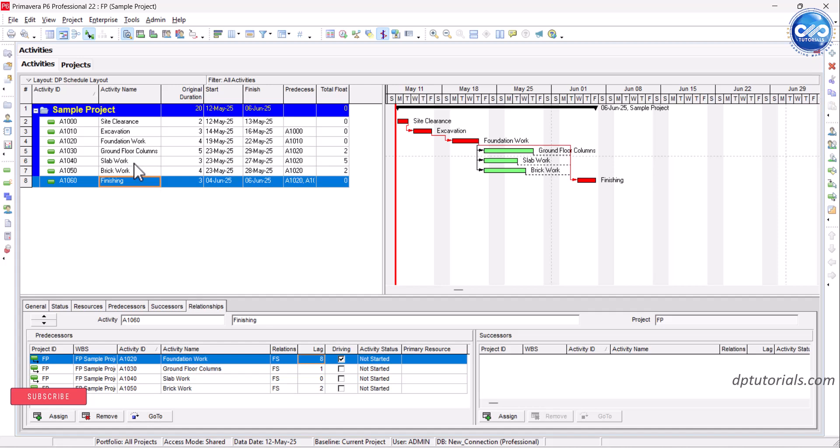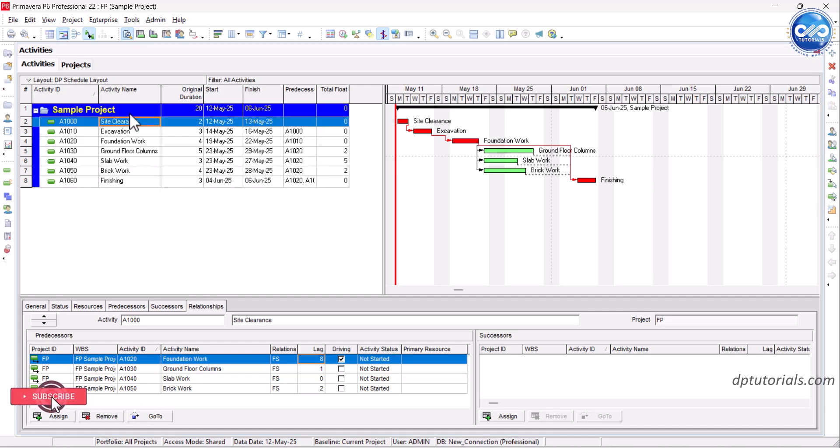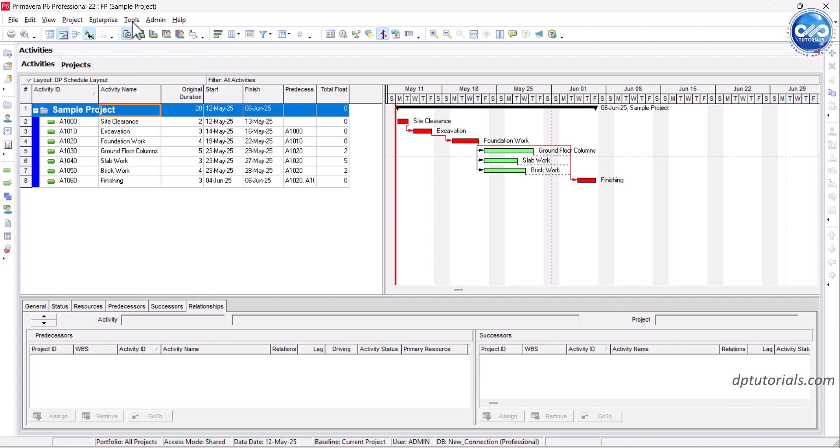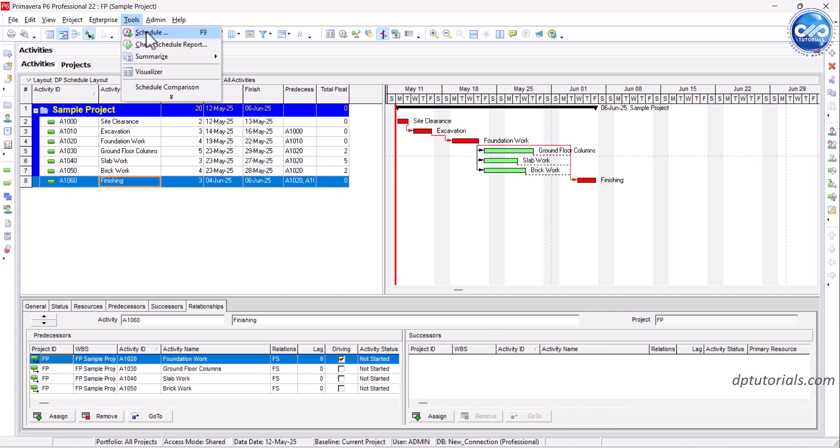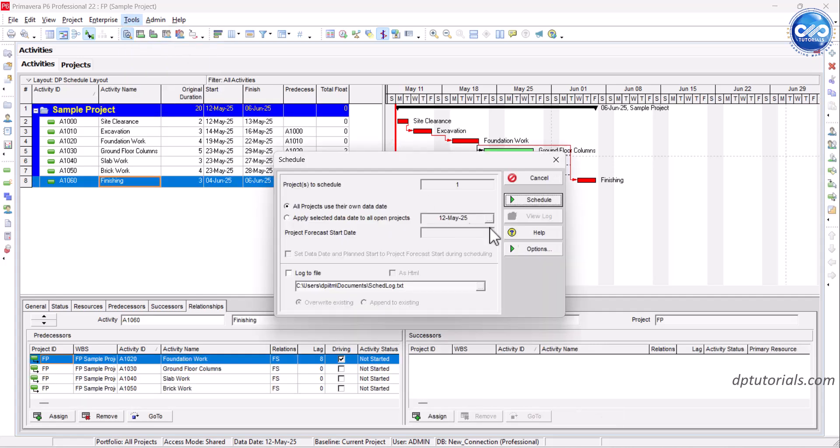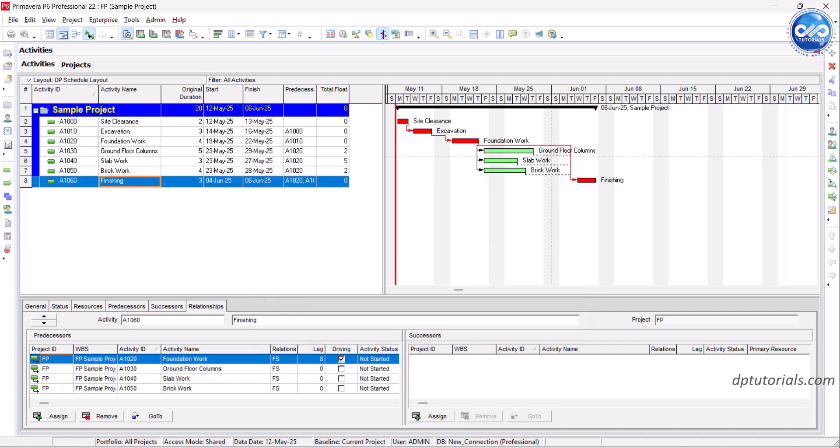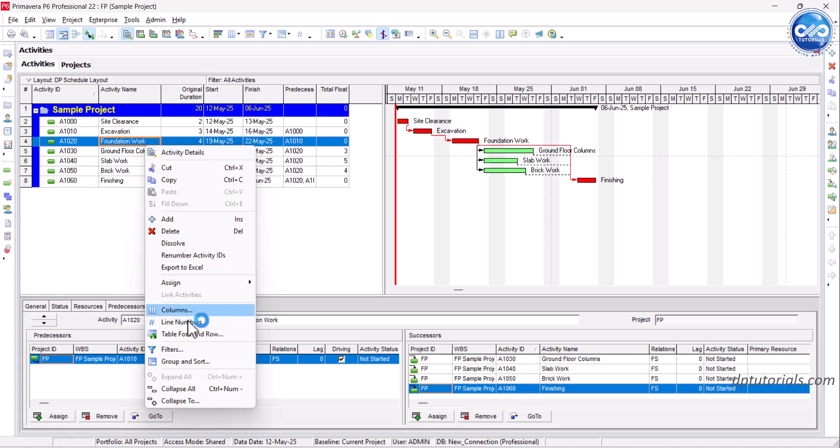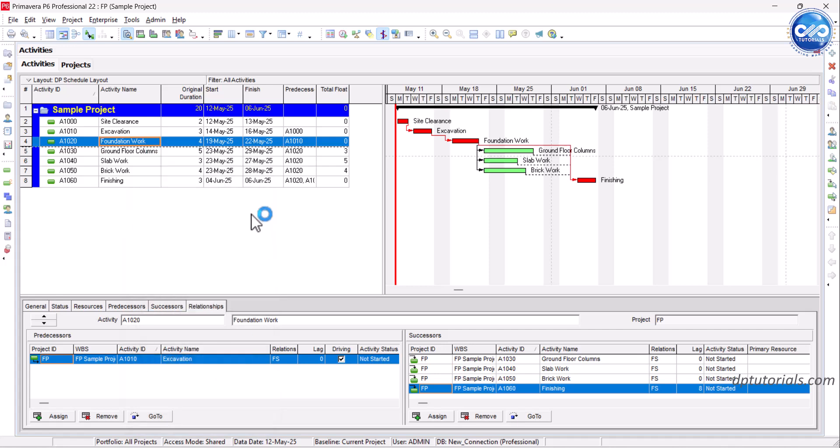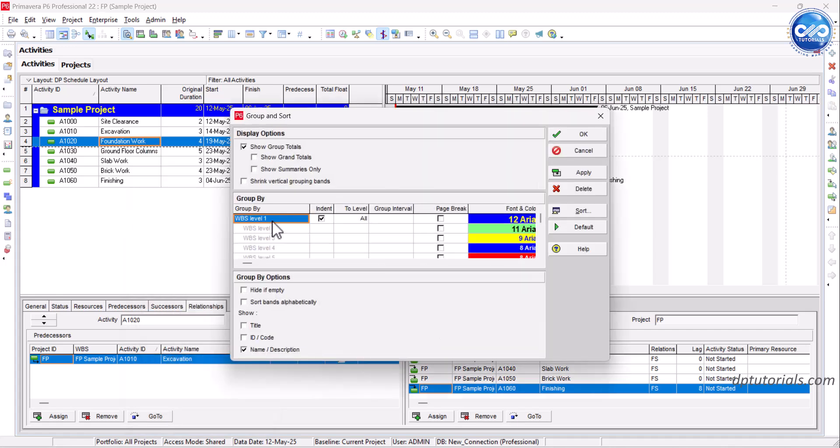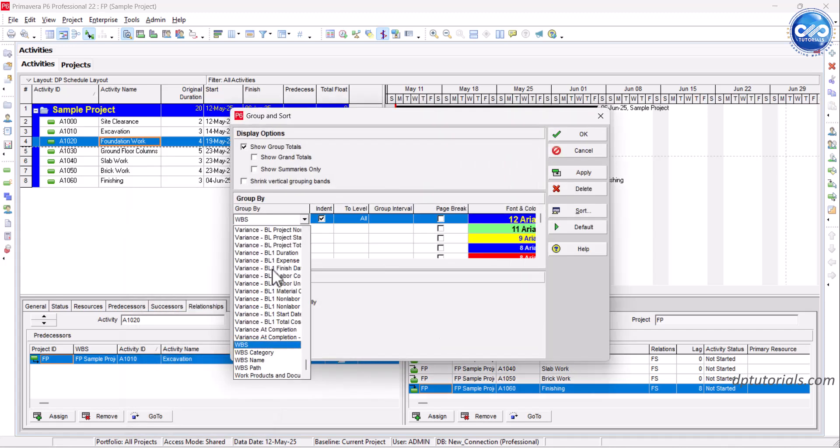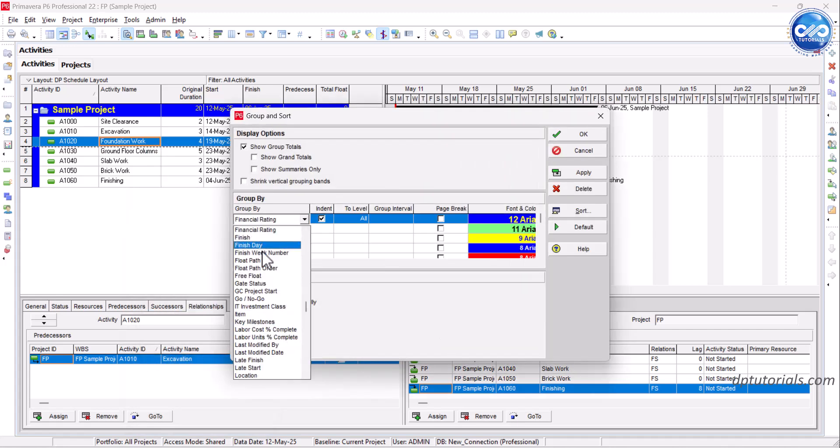Now let's talk about how to visualize this in Primavera P6. Click on Tools, Schedule and ensure the project schedule with the correct data date. Then, go to View, Group and Sort and choose Group by Float Path.